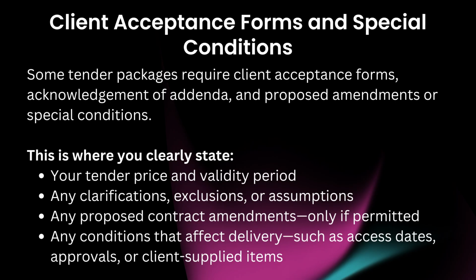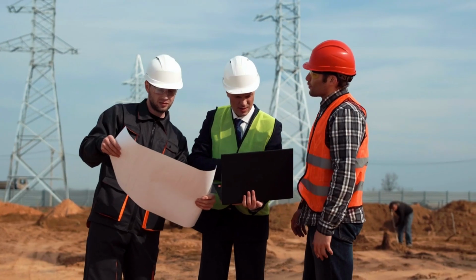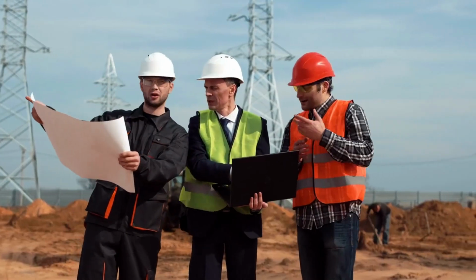Client acceptance forms and special conditions. Some tender packages require client acceptance forms, acknowledgement of addenda, and proposed amendments or special conditions. This is where you clearly state your tender price and validity period, any clarifications, exclusions, or assumptions, any proposed contract amendments only if permitted, any conditions that affect delivery, such as access dates, approvals, or client-supplied items.